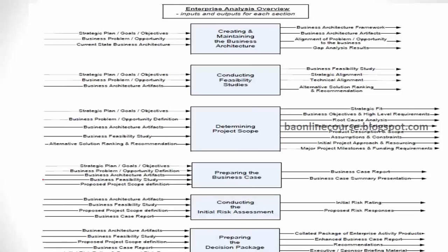Then finally, you'll depict all that into a business case document, and then say, we need to invest $2 million for this project, and it will have these 20-30 features, and it will take us 6 months to complete this project. After that, for the next 4 years, we'll be getting like $1 million every year. So overall, it has a return on investment of X percentage. Right? So that is exactly what you do as part of your business case document.